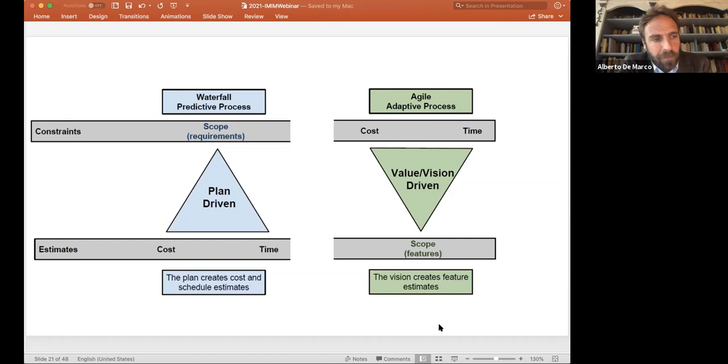Basically, we could work with deterministic approaches, sometimes with some probabilistic, but quite rarely. Mostly we work with deterministic approaches. So we predetermine a budget, an amount of money which is available, and the duration, and we get an approval. Then we start a project with that budget approved and that duration approved. And if something goes wrong, we tend to prepare a contingency, a budget of money that could stay apart and could be spent to recover from possible delay or adjust for problems that may occur during the project execution. So it's a budget plus contingency management.